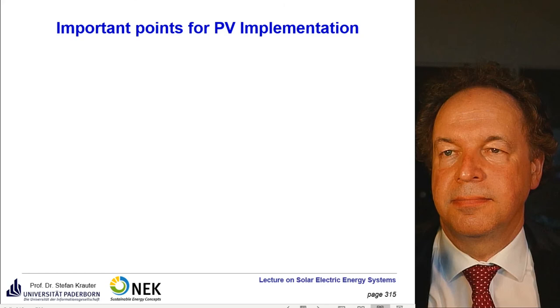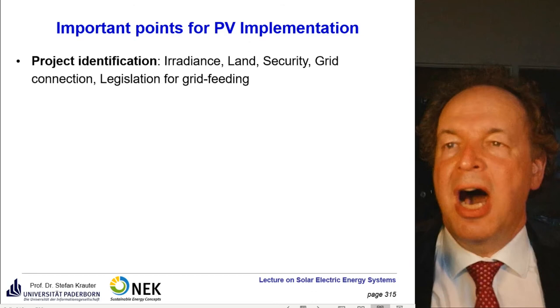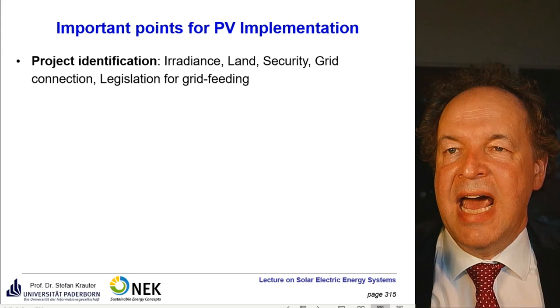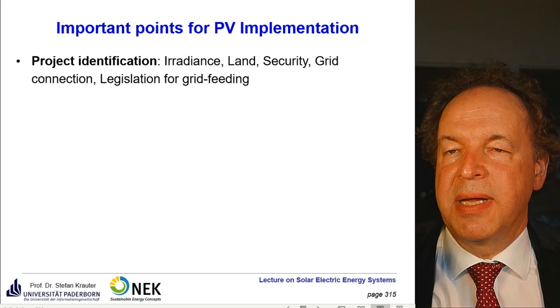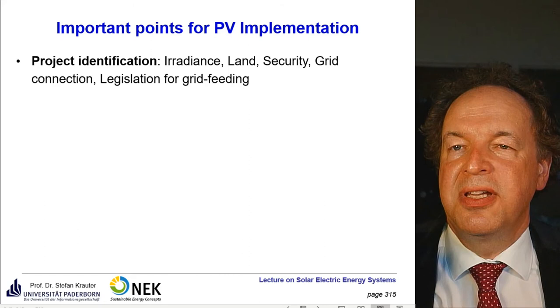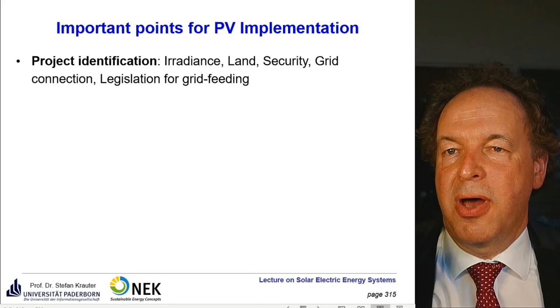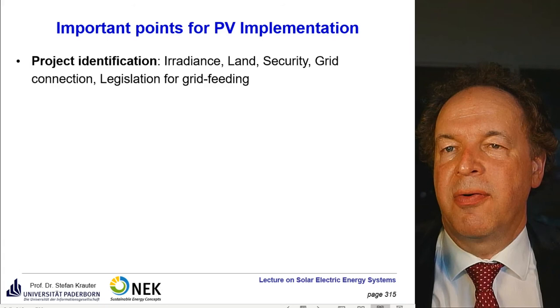Some important points for PV implementations are the irradiance. Sure, we talked a lot about that. The land, the safety or security, the grid connection, the legislation of grid feeding. Is it paid in local currency? Is the government stable? Because even in Europe, some governments decided later that they would stop grid feeding, and this was very bad for the investors. If you have a return on investment, perhaps after 10 years, or usually it's not that long, 7 years, but the government decides after 5 years to stop the whole project, that is quite risky.